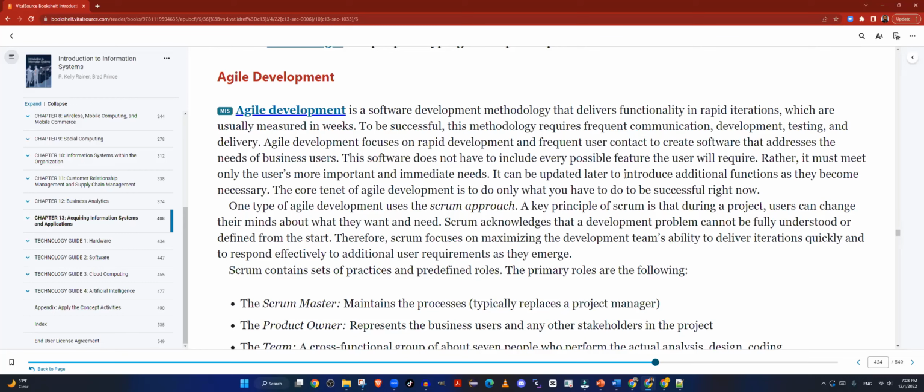Then you look at each story, and then you start breaking down a story into further components. And then you come up with the timeline and the resources for each story. And you build your stories, and then you deliver one pack and say, okay, the first phase is done. You're good to go. Work with it because that was your first priority while I work on your second priority.